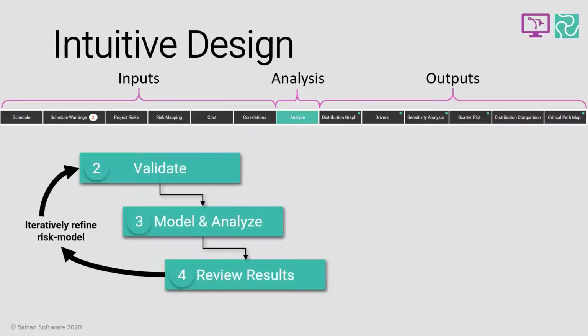This means that it's even easier to work more collaboratively in, say, a risk workshop environment, as others can follow the breadcrumbs, so to speak, with a net result that we can actually loop around steps 2, 3, and 4 of the iteration cycle far fewer times because collaborators are spotting the anomalies and issues with the inputs before we actually run the Monte Carlo simulation, which inherently saves time. It grows team trust in the model input and may even save time later if multiple contractual parties have co-created the model together. Individuals are less likely to challenge the outputs later.